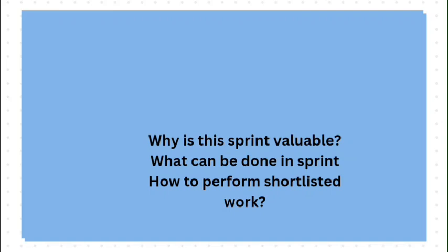Developers will typically break the product backlog items into smaller work items, so that we can create shorter subtasks. Okay, this task is going to take 8 hours, so they will maybe create one day long stories, one day long subtasks, so that we can break the work into simpler activities which can be easily worked on.